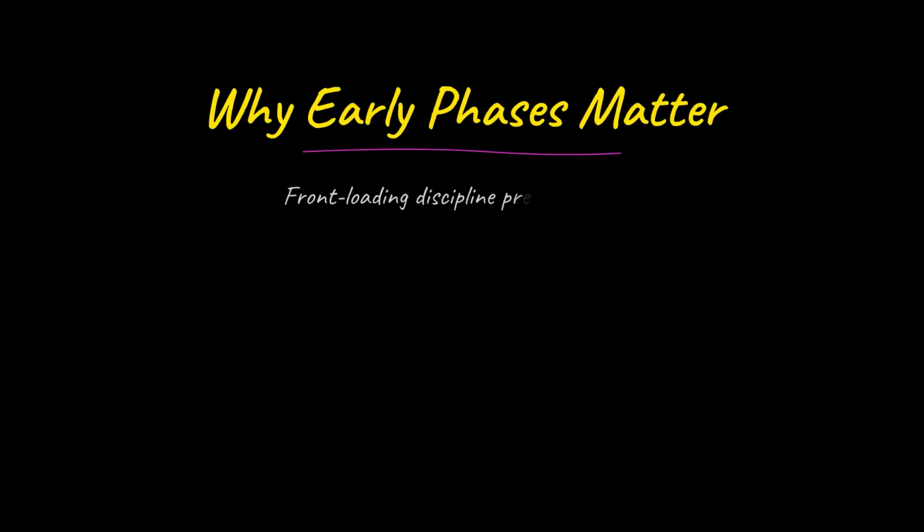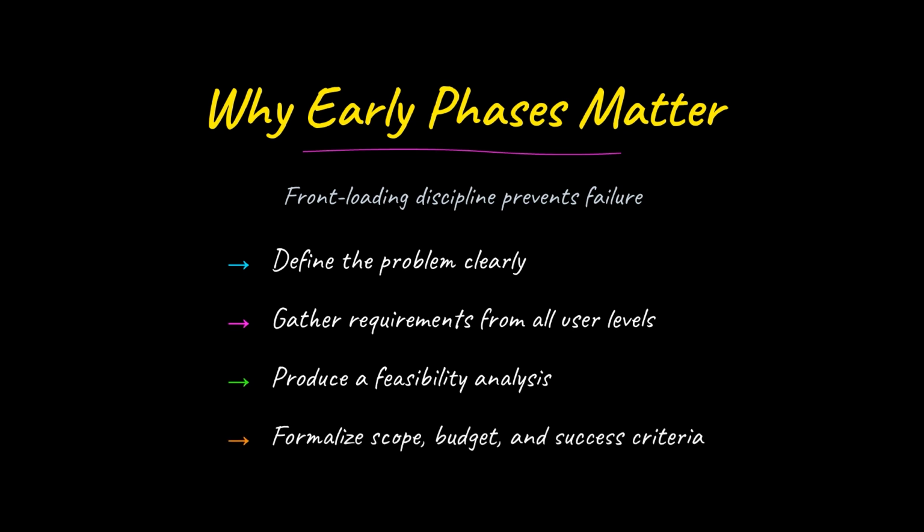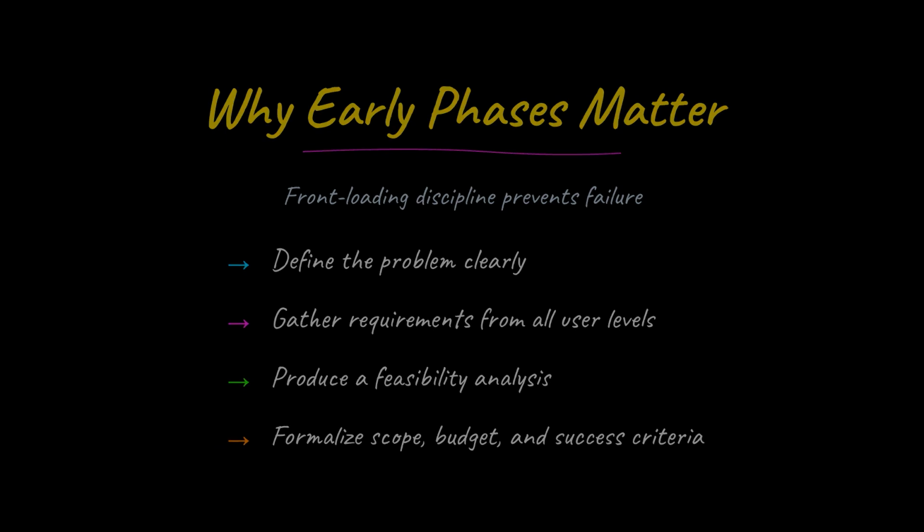project failure. The planning and analysis phases set the entire foundation. Teams that jump into coding or vendor selection without understanding users and operational constraints consistently produce systems that fail to deliver expected benefits. Requirements gathered from frontline workers, not just leadership, are essential.